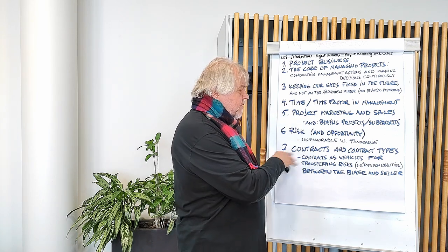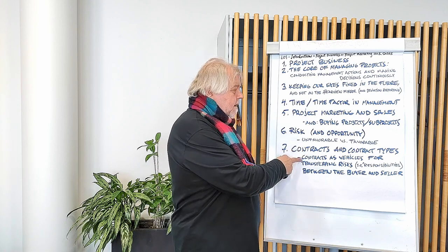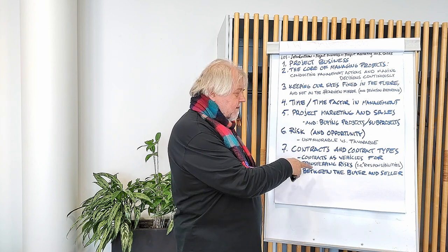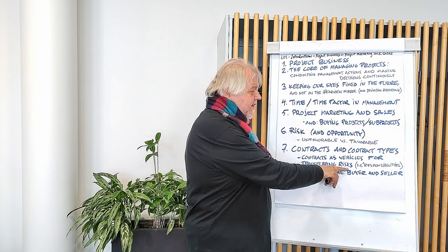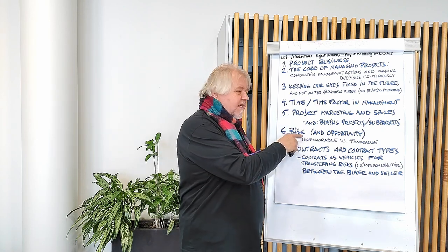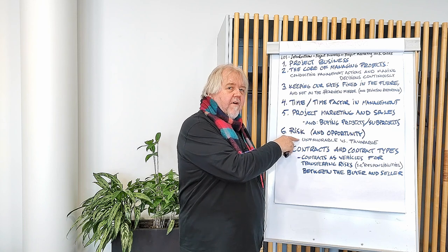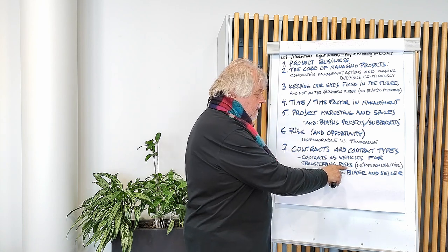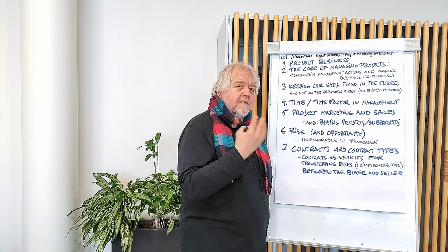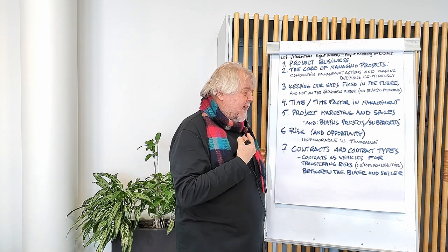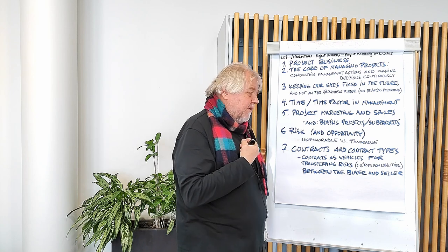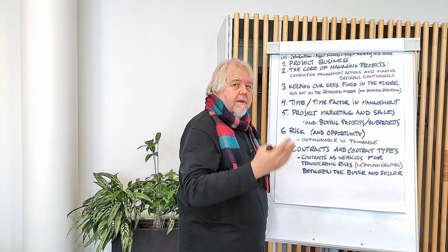So contracts and contract types. And we are going to discuss contracts as vehicles for transferring risks between the buyer and seller. And when we are talking about transferring risks, we are talking about transferring responsibilities. And risk as a concept is not necessarily an unfavorable thing. It might be that, for example, a contractor that is transferred some risk takes that with pleasure because the contractor can make profit by taking the responsibility of a certain project and inherent risks.